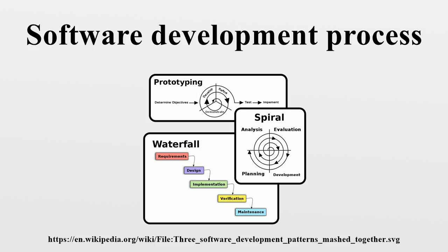Rapid application development is a software development methodology, which favors iterative development and the rapid construction of prototypes instead of large amounts of upfront planning. The planning of software developed using RAD is interleaved with writing the software itself. The lack of extensive pre-planning generally allows software to be written much faster, and makes it easier to change requirements.